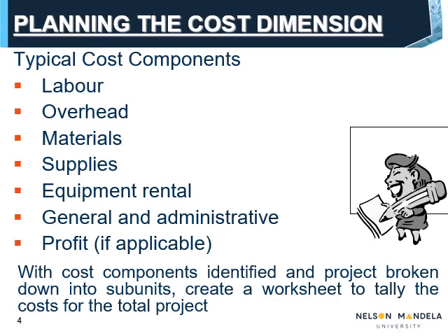The following has been identified and defined as typical cost components. Labor. This is the wages paid to all staff directly working on the project, for the time spent on it. Overhead. This constitutes cost of payroll taxes and fringe benefits for everyone directly working on the project, for the time spent on it. It is usually calculated as a percentage of direct labor cost.